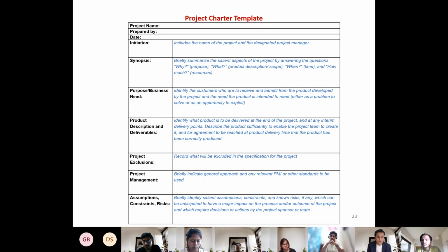Just as an example, you can say, I have given you a cost of 2 lakhs, but it will not include my annual maintenance contract. That means you have to buy the annual maintenance contract extra. Again, there is no right or wrong answer, but you're practicing how to create a project charter, and you now know the templates. So the next one is project management. That is easy. Basically, this is the methodology. So what will you write there?